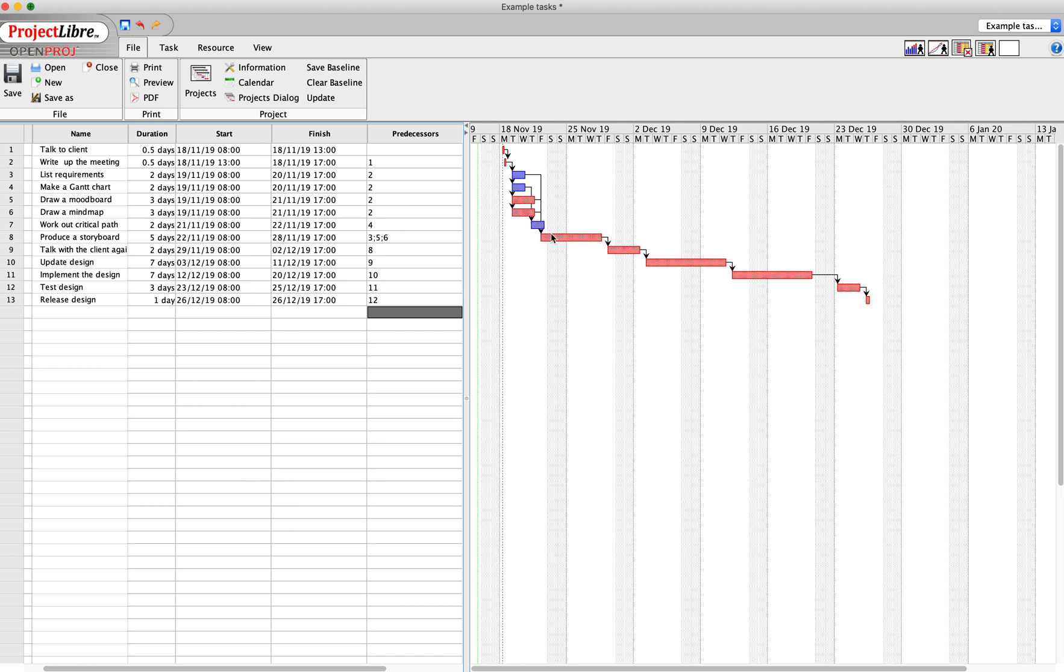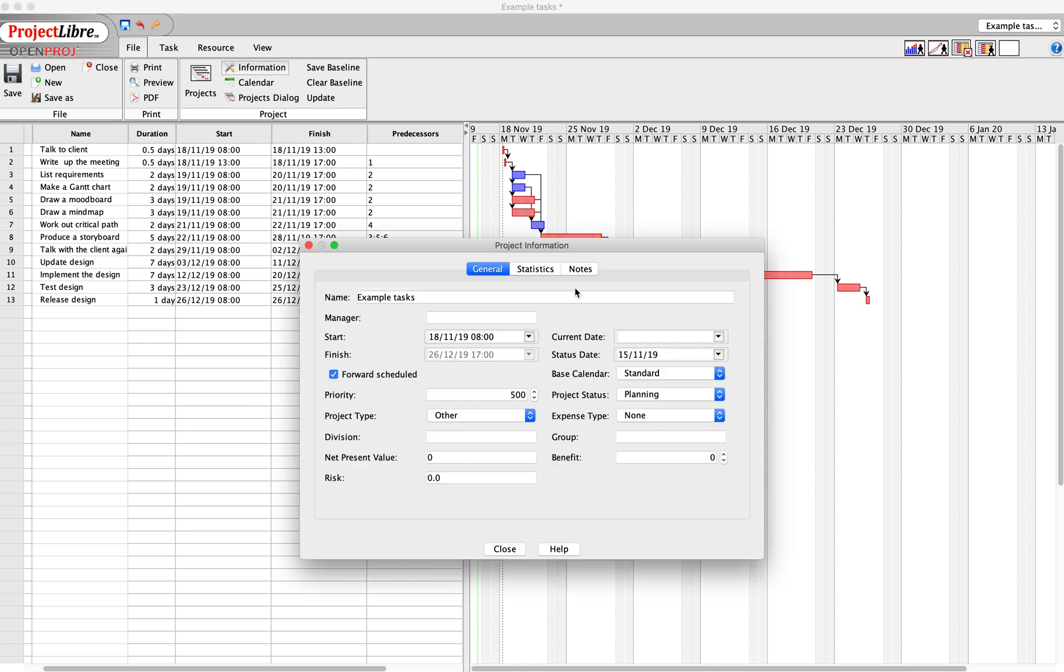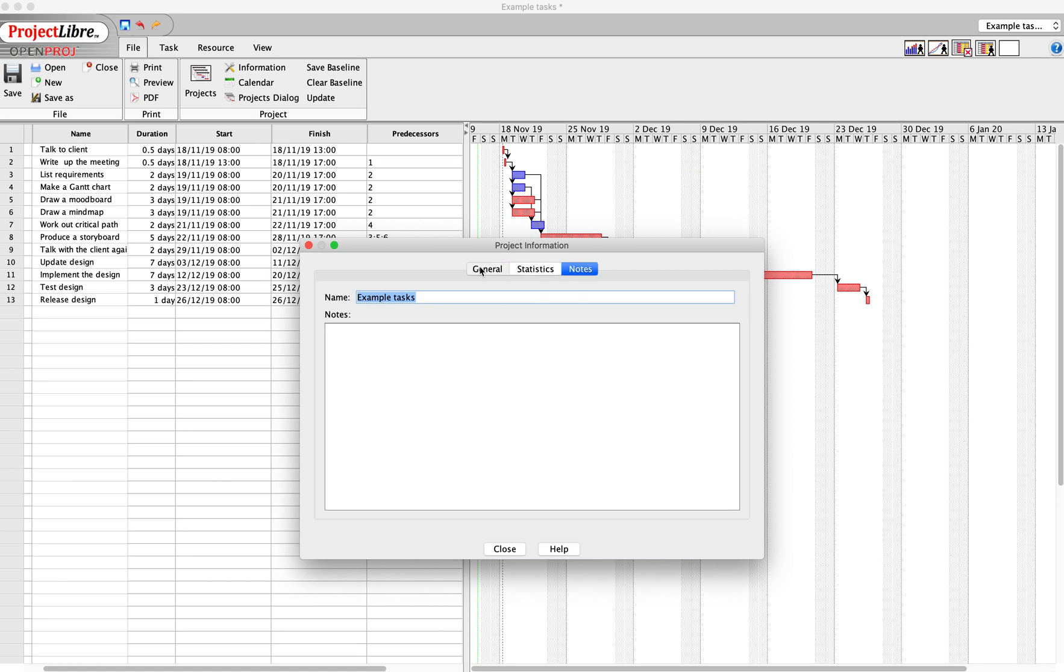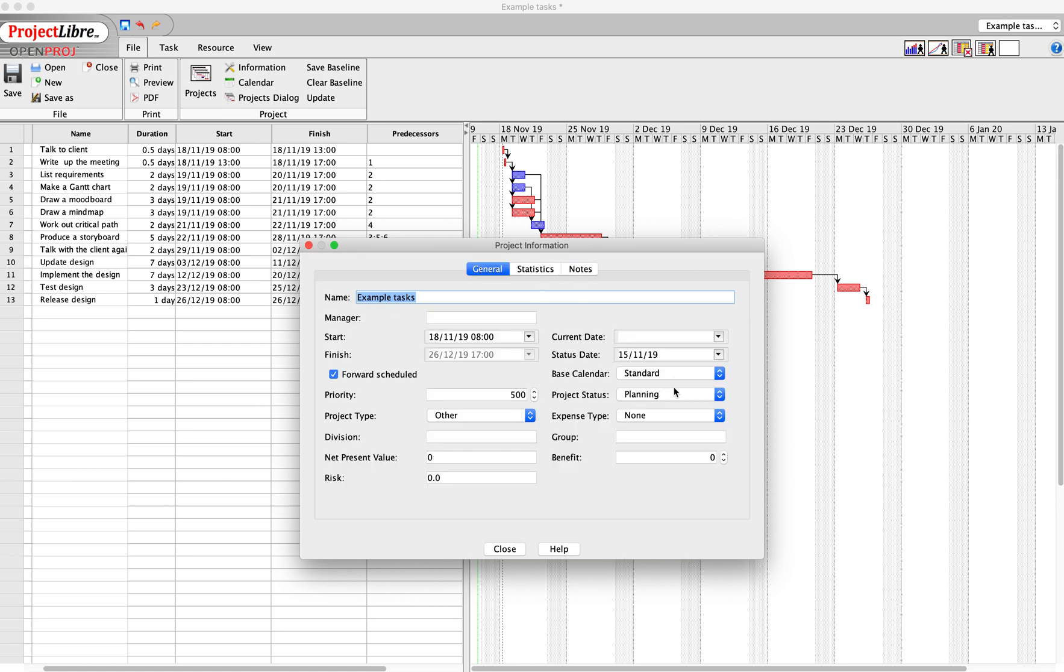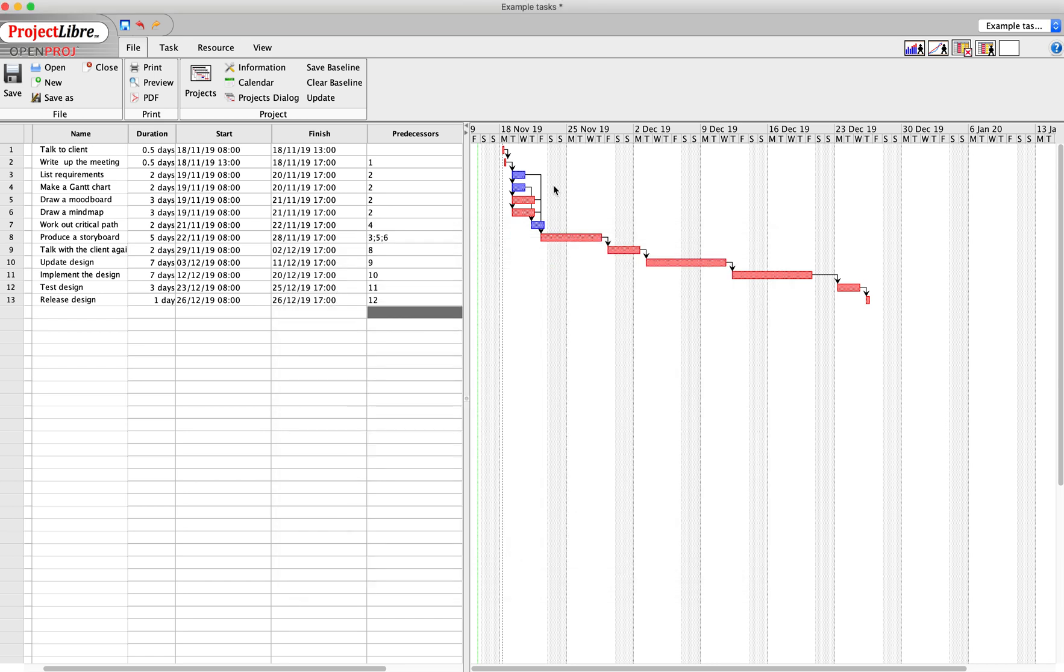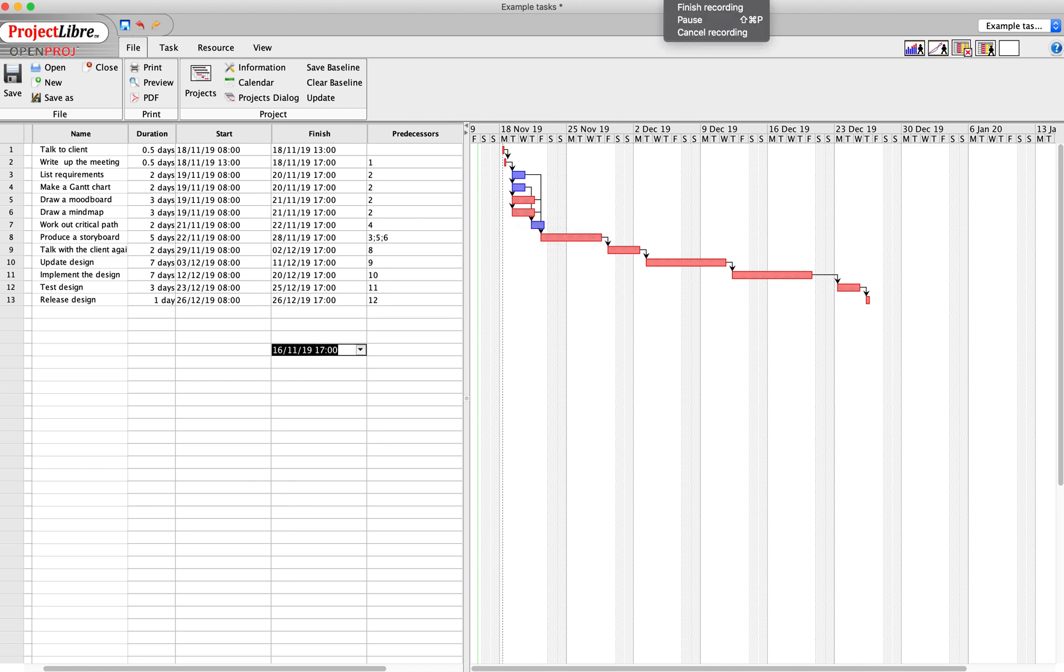On here, as you can see, you don't work Saturdays and Sundays. You can change that somewhere in here - I can't honestly remember. So you can change, for example, to 24 hours instead of just eight till fives, and you can definitely change weekends as well. But that gives me a Gantt chart for my tasks, and the bits that are red are because that's my critical path. So there you are, one Gantt chart.